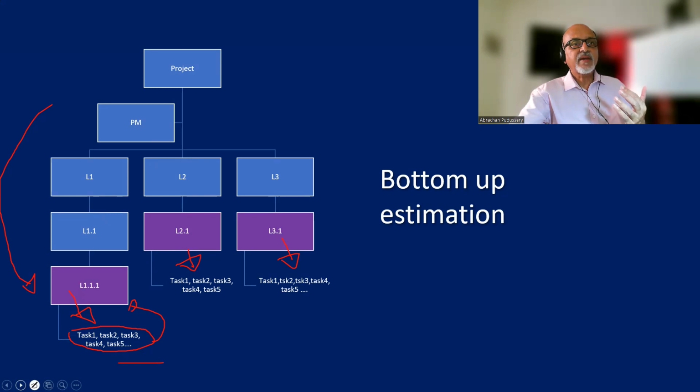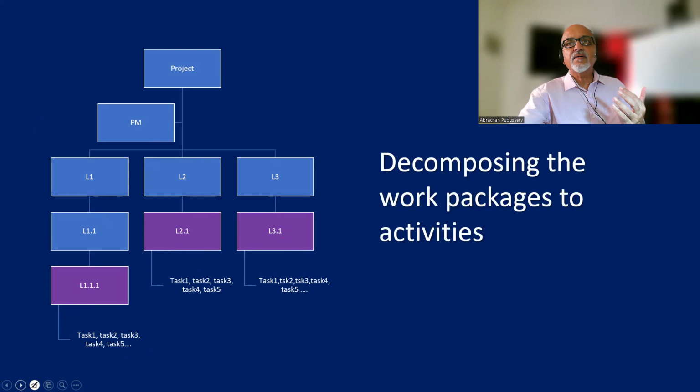And at this stage, this is the time when we decompose the work packages into activities, and then, as discussed earlier, we estimate at activity level and then roll up to the work package level.